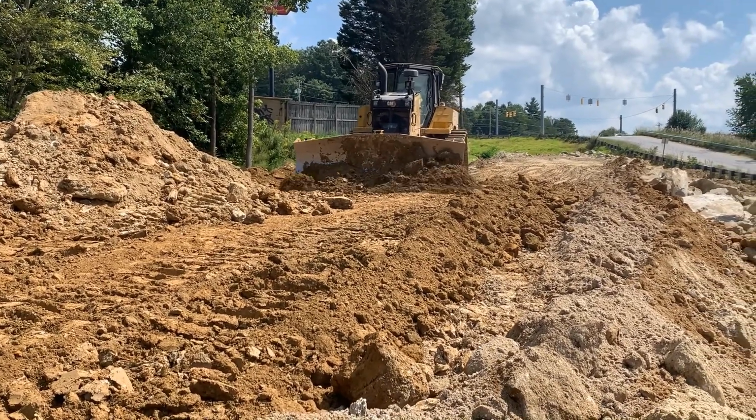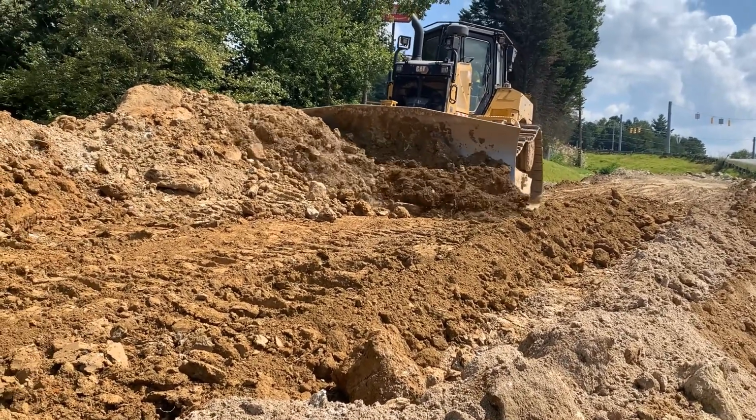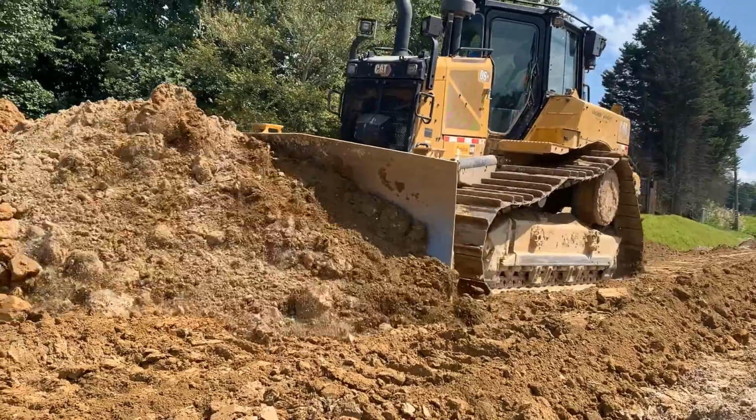Ultimately, the project engineer should end up with an overall quantity and an overall cost, allowing them to determine the cost per cubic yard, the amount of dirt moved per man-hour, or other useful information.